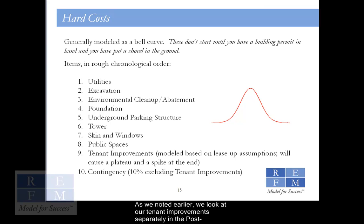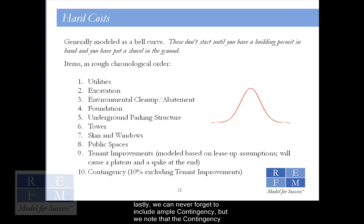As we noted earlier, we look at our tenant improvements separately in the post-construction phase, and these will be modeled based on our lease-up assumptions. And lastly, we can never forget to include ample contingency, but we note that the contingency does not apply to the tenant improvements budget.